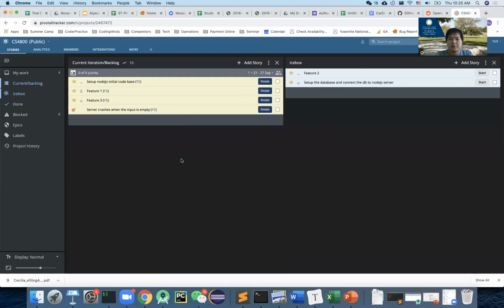So every day as we do the meeting, you need to update this process. For example, I finished this one here. I click on finish. And deliver means that you actually release it. So they give a more specific step. I'm going to click on deliver, and then even accept, reject. This means that the customer will actually accept it, or maybe the team, the QA will accept it.